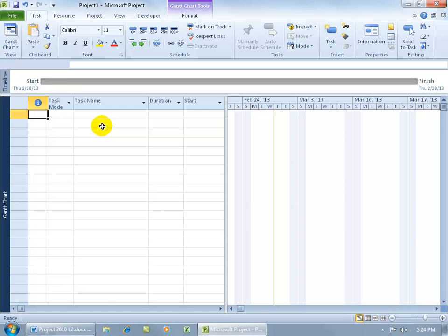In any case, if you run into a problem where you're trying to import data from an Excel file or an Access database file and it doesn't match up the fields, like maybe you named it something that Project can't tell if you mean the start date, the duration, task name, you can do what's called mapping. And I know I covered it briefly in the previous training video, but the definition of a map is a set of instructions that traces type as well as the location of data to be imported or exported, which we'll cover in the next training video. But again, the type and the location. So is the type of data in the task name field going to be numbers? No, it's going to be text. If it was in the duration, it wouldn't be text, it would be numbers, right? Or a date, more specifically.